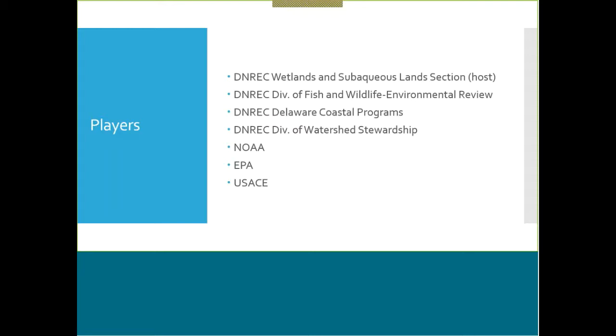As a networked program, we rely heavily on the concerns raised by the subject matter experts in the room to consider the magnitude of effects to coastal uses and resources. However, I want to explain that federal consistency and DCMP's authority to review the proposed projects is dependent on whether there's a federal action taking place, and it includes federal authorizations, which is typically one of the core permits that Mike was talking about earlier.